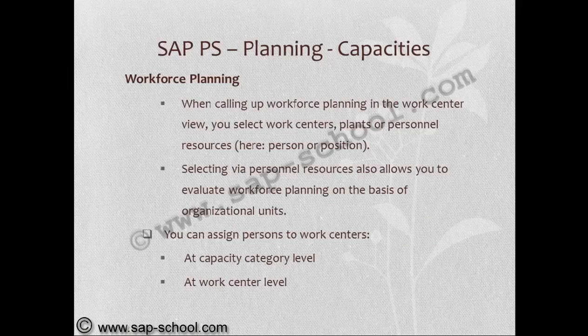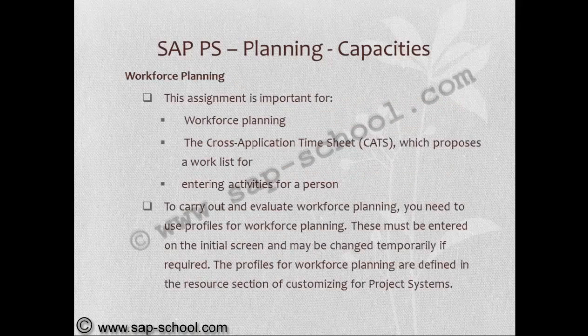When calling up workforce planning in the work center view, you select work centers, plants or personnel resources. Selecting via personnel resources allows you to evaluate workforce planning on the basis of organizational units. That means it is in the HR master organizational units. We can assign persons to work centers at capacity category level or at work center level. The assignment is important for workforce planning. The cross application timesheet proposes a work list for entering activities for a person.